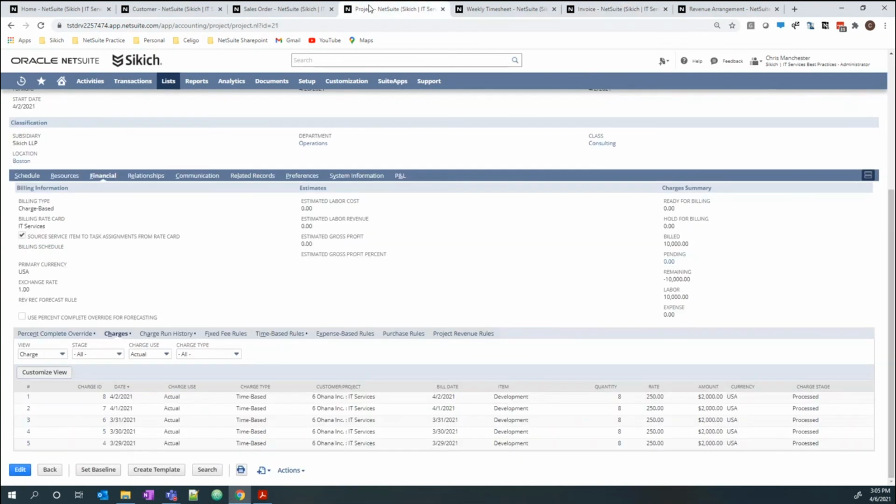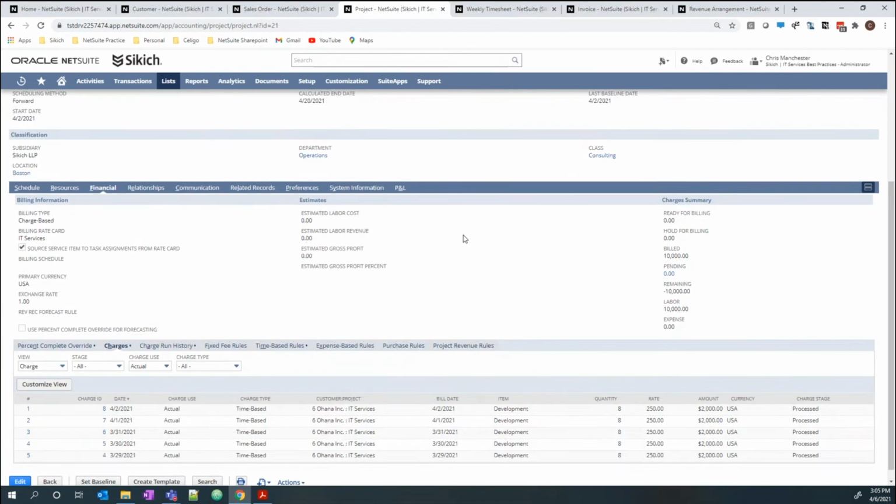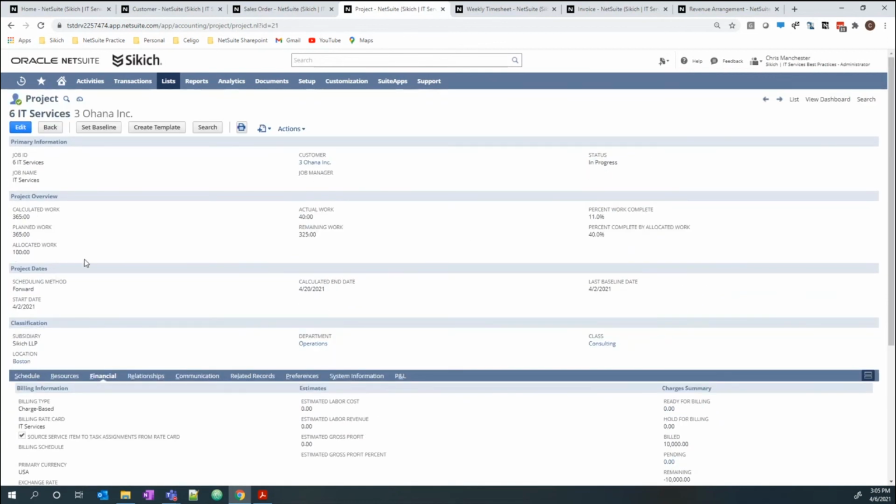Okay. Now, if we talk a little bit about project status. So again, project status for us can handle a number of different things. One, communication to project managers, how they're actually executing on projects. This can be leveraged for internal stakeholders like executives or finance to really get an understanding of, are we profitable for this particular project or are we lagging behind? It can be used for external clients, and we'll talk a little bit more about that in Experience Cloud. And then really from more of a financial aspect, it can be a driver of revenue recognition.